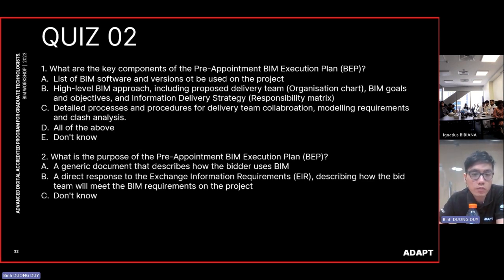After you decide, like if you're choosing Revit 2023, that's the software you're going to use. If you give that before you get the contract, then after you got the contract, you cannot change. Maybe you see that 2023 has so many errors, and you think you need to change to 2024 or 2025, the latest version now. They cannot change anymore because it's already recorded in the BEP. So before the contract, you should not give any absolute or accurate answer there.